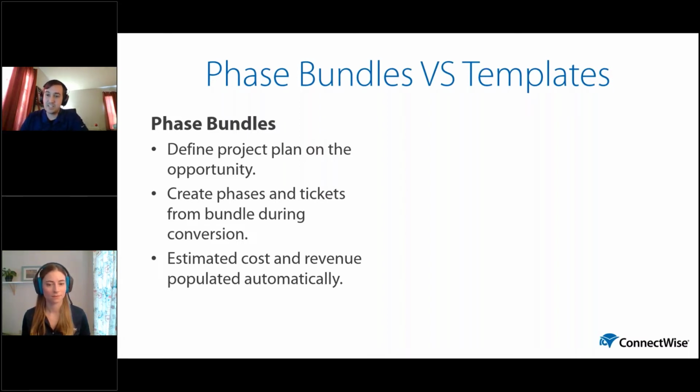I saw someone mention that they build out their quotes from previous projects. This is another powerful tool you can use when you're building out those quotes by looking at your past projects and seeing how close you were to those revenue and cost estimates that you had initially.